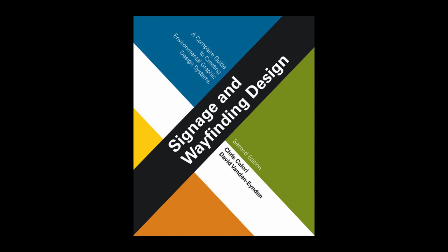Bid review. Bid review involves the analysis of the bids submitted by fabricators. The client's rep will usually organize the numerical bid results in some form, such as a table, and the designer should review this information for discrepancies or red flags among the field of bids, such as an unusually high or low price for a given sign type, or a wide spread between the lowest and highest bids. The designer should advise the contract rep of such anomalies and have the rep request clarification.